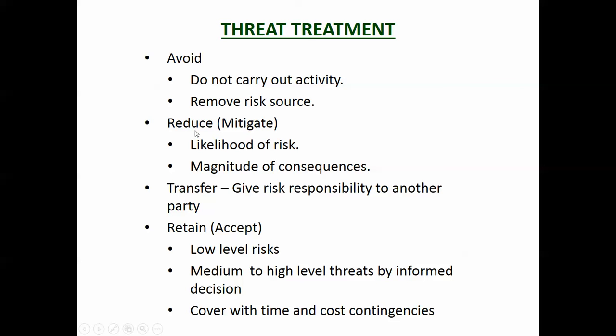Another one is to reduce or mitigate. So you reduce the likelihood of the risk. In other words, you might put shoring into the trench. The risk is still there, but the likelihood of someone getting trapped is much less than what it would have been otherwise.